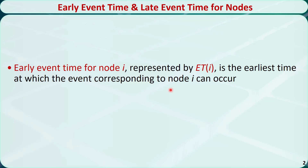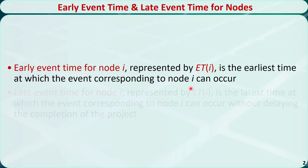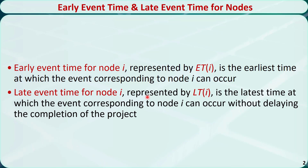Early event time and late event time are associated with nodes in the network. Early event time of node i is denoted by ET_i. It is the earliest time at which the event corresponding to node i can occur. Late event time for node i is denoted by LT_i. It is the latest time at which the event corresponding to node i can occur without delaying the completion of the project.